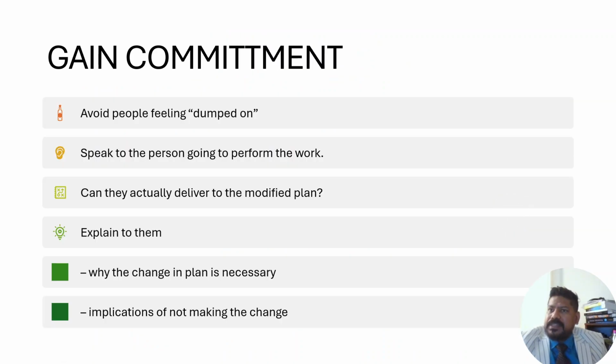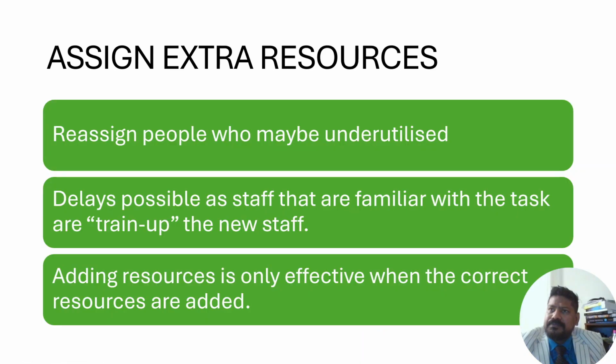Okay, gain commitment. Avoid people feeling dumped on. Do not put too much on the plate right at the first go. Speak to the person going to perform the work. Can they actually deliver to the modified plan? Explain to them why the change in plan is necessary, the implications of not making the change, etc. Reassign people who may be underutilized. Delays are possible as staff who are familiar with the task are trained up. Adding resources is only effective when the correct resources are added.